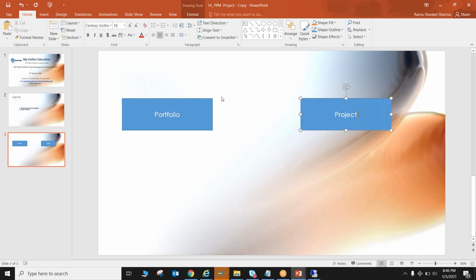The reason is that in the standard program which transfers the project from PPM to PS, that particular profile code is hard coded. When you go for enhancement, in that hard coded place you make a combination: if you select this project type, the system has to select this project profile. Rest of the things you can change.